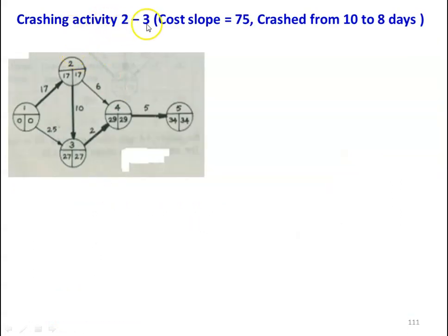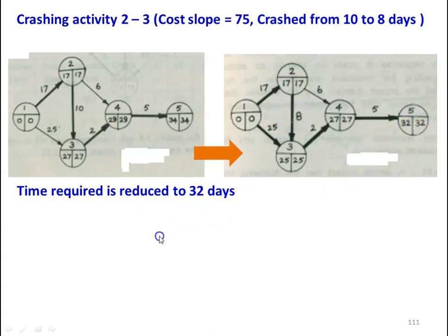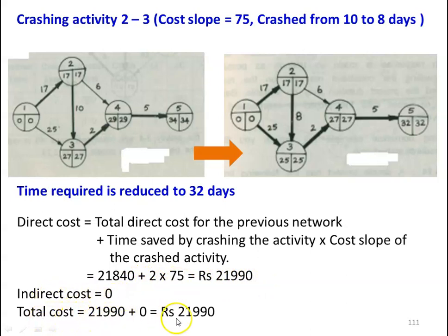Now, crashing activity 2-3 with cost slope 75, from 10 days to 8 days. The project duration is reduced to 32 days. Direct cost = 21,840 plus (2 days saved × 75) = 21,990. Indirect cost equals 0, so total cost equals 21,990.